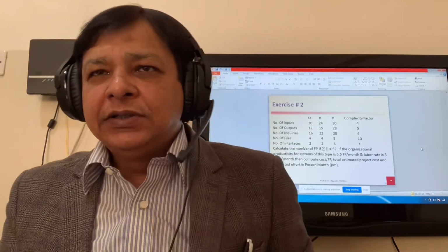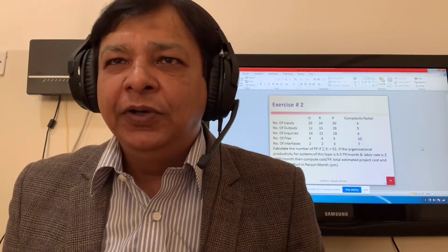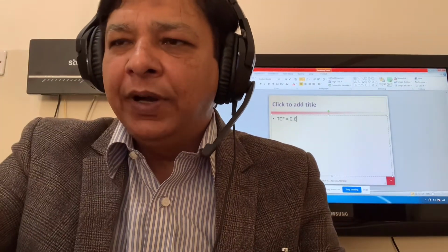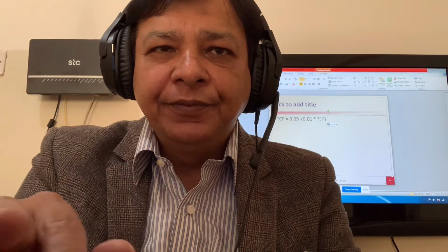Our sigma Fi value is 52. So TCF is equal to 0.65 plus 0.01 multiplied by sigma Fi, and the sigma Fi value is 52. Calculate TCF, the technical complexity factor. 52 multiplied by 0.01 plus 0.65.